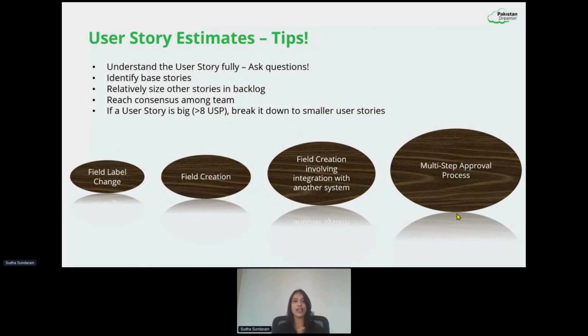Identify a base story. Again, this is something as your team. Don't identify a base story from a different team or from a totally different mix of team members, right? It should be something that you had done in the past. So base story is something that we as a team had delivered in the past, and that was our smallest, right? So it should be our base story. It should not be someone else's base story, correct?